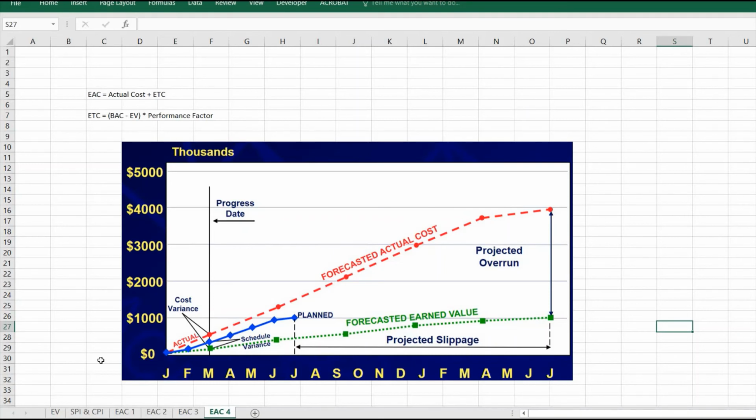Another method of forecasting is by using curves, and is useful for forecasting any piece of data represented by these curves. The forecaster makes the best estimate using the typical shapes of the curves and whatever other information may be available to make the projection. No single forecasting method is recommended. Rather, forecasts by different methods should be performed to provide a range of possibilities.